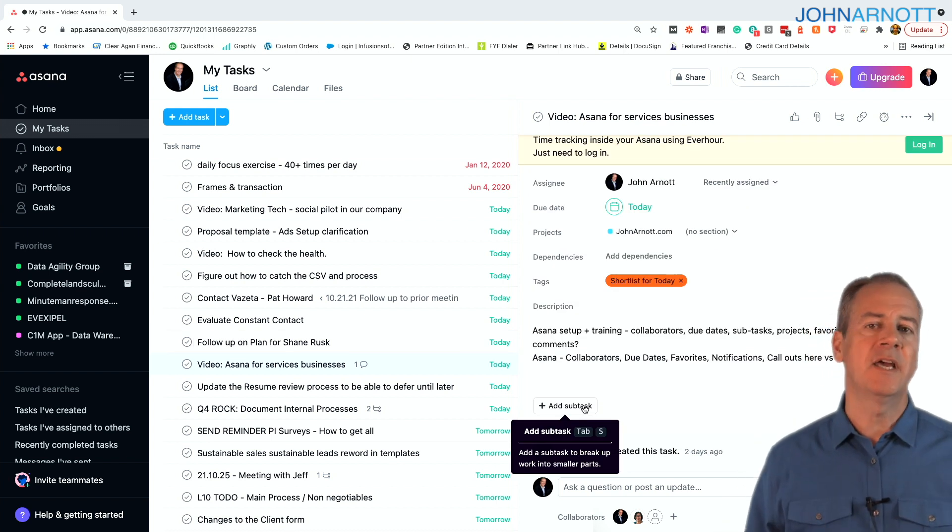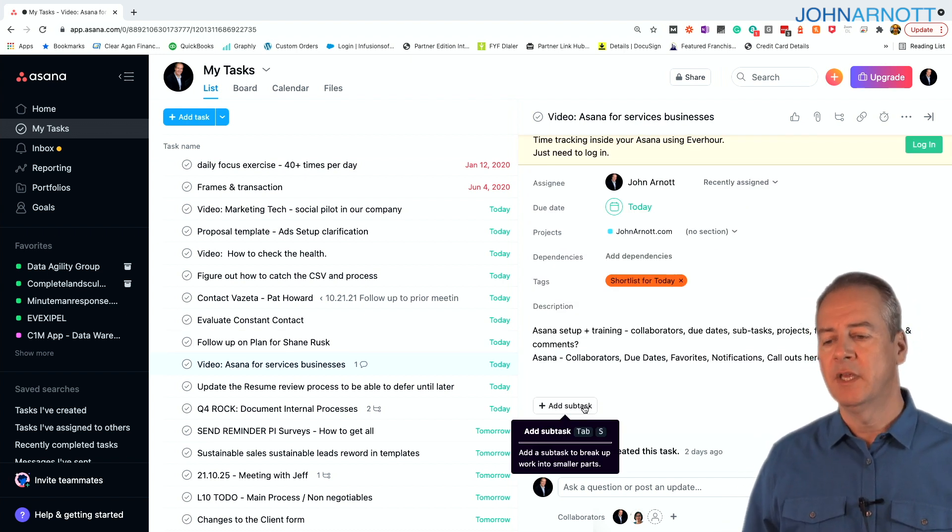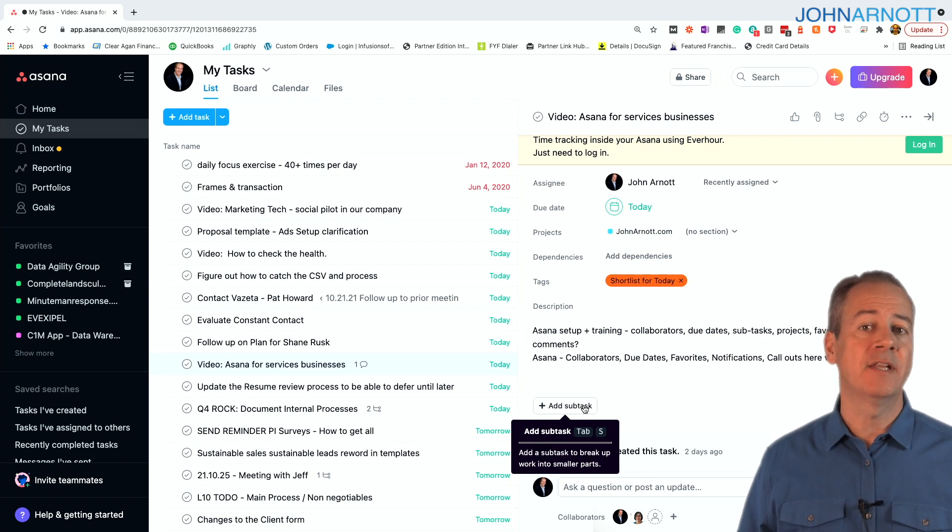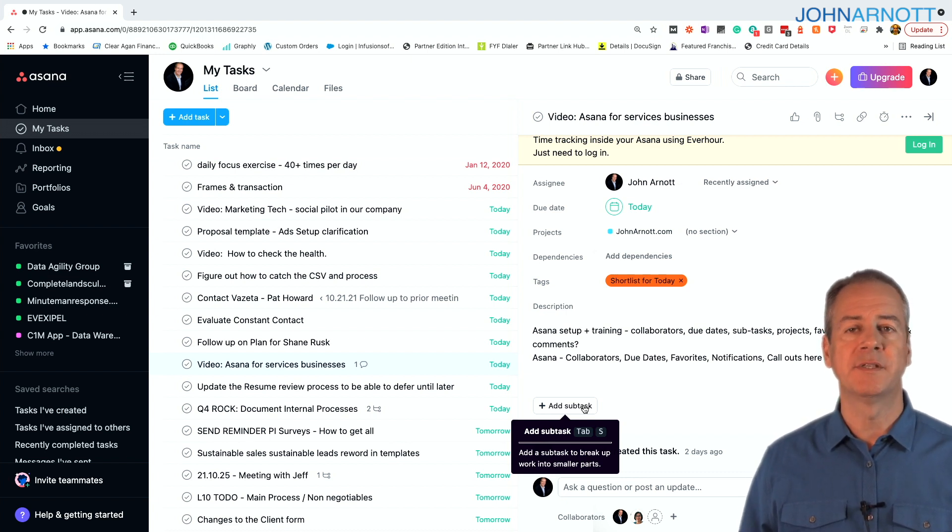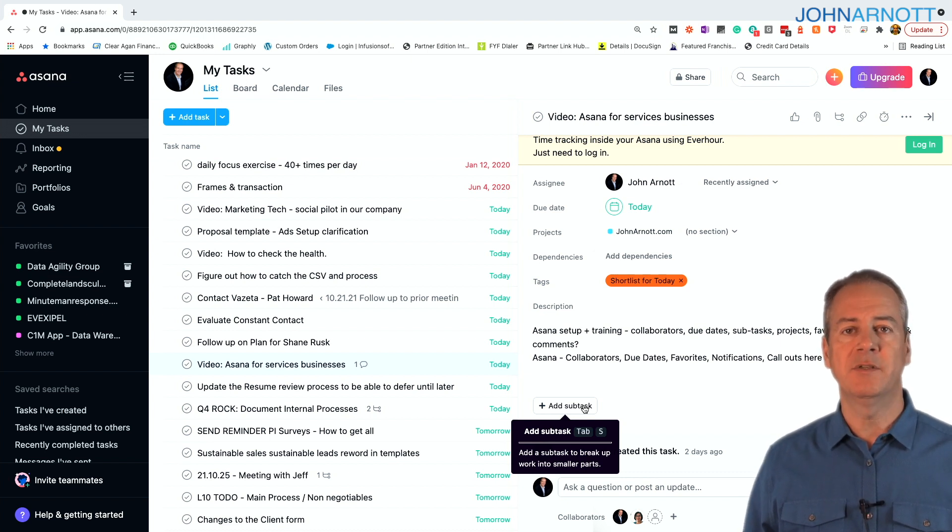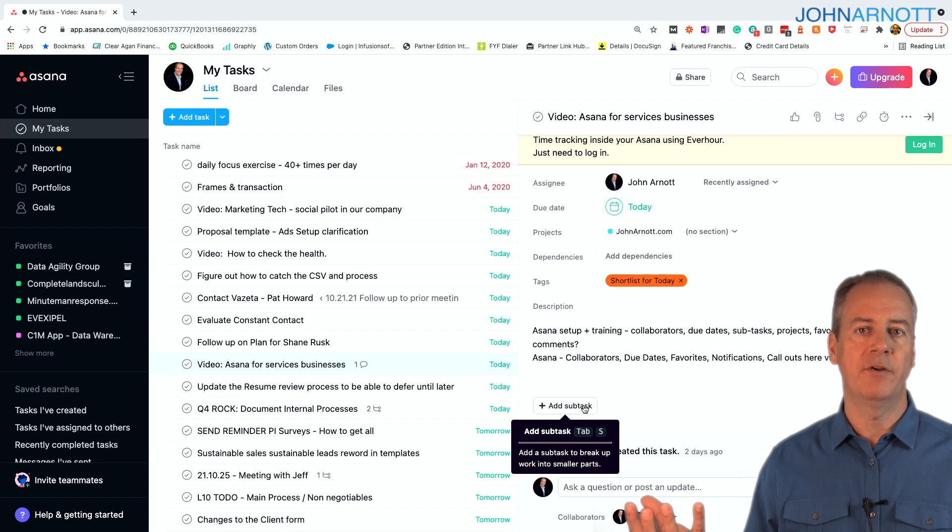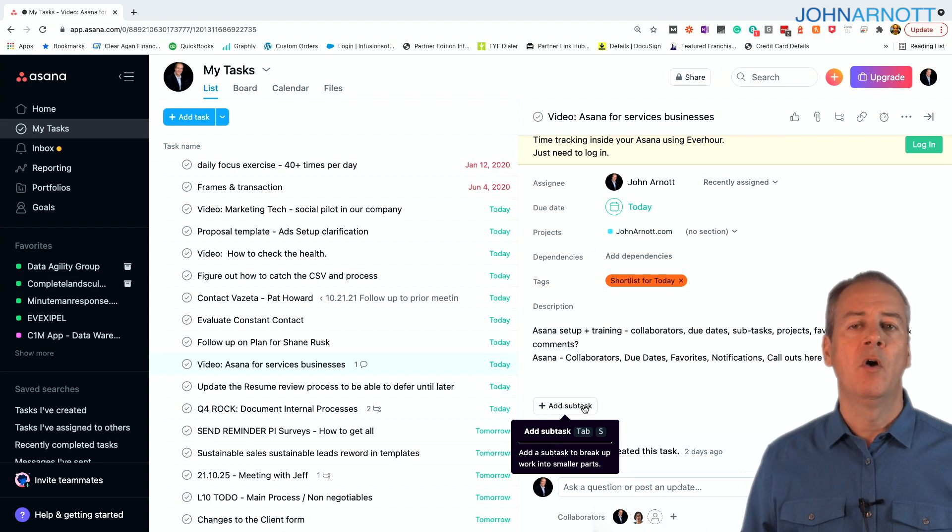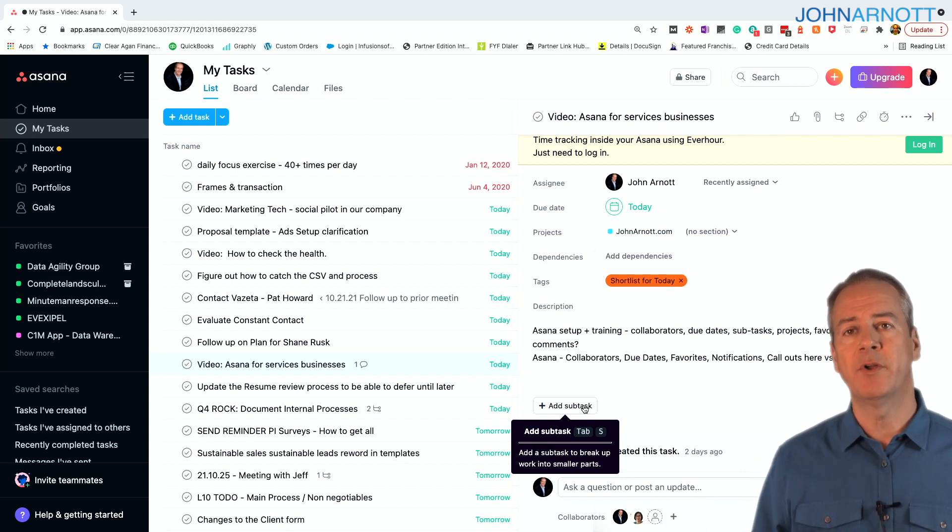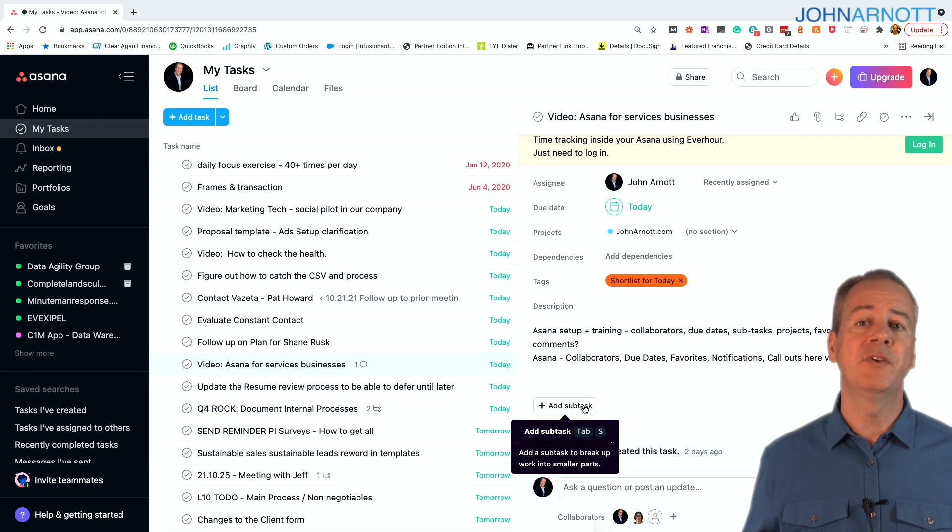Now when you're managing tasks or giving tasks or even working tasks, sometimes there are many things that have to be accomplished for that single task to be marked complete. And those many things either are dependencies, whereas you have to do one thing before another can happen, or they're subtasks. They are a subset of what you're trying to accomplish.